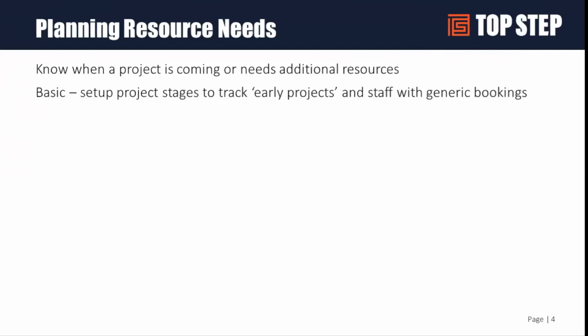It's probably too early to even earmark somebody. So what I'm going to do is just put a pin in it and say, I need a consultant. And I'm just going to schedule a consultant to do that work. And a lot of times people will use the resource bookings feature, the resource module, to do those early projects, early tracking. Now, how do you track an early project?